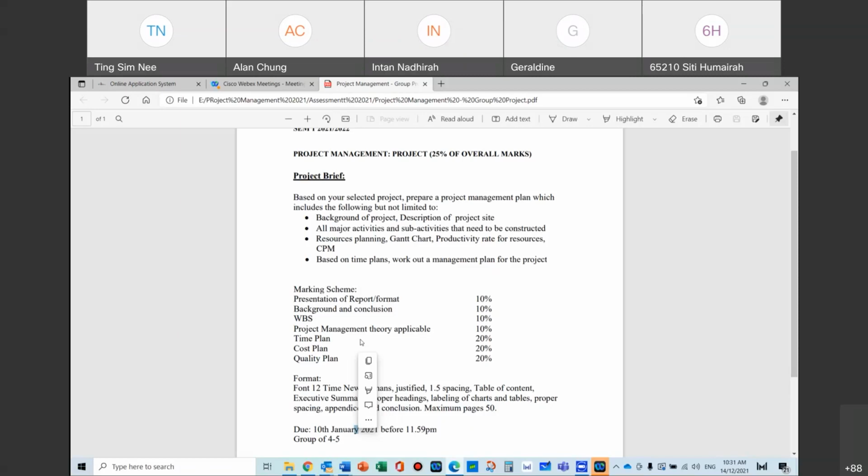Yeah. And in most constructions, they would engage, rent a bulldozer that comes with a driver. Nobody really would rent a bulldozer without a driver because it is very special. It's just like a crane machine, a power crane. You can't have it without an operator. Like all these specialized machineries, normally it will come as a package. So your thought is not wrong. In fact, it is correct, and it is what the majority of people will be looking at.